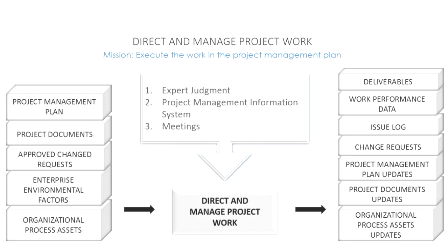Now, organizational process assets updates are updates to OPAs, updates to organizational process assets. Which particular OPAs are we talking about? It could vary, but I would like you to specifically think about lessons learned that you glean, because as you glean lessons learned from different processes, they are going to be used as organizational process assets updates. You're going to update processes and procedures as needed. You're also going to update the corporate knowledge base as needed. You're also going to update any, let's say, project document templates. Any templates that need to be updated, we also need to look out for those here and update them as we go along. So this is a really loaded process.